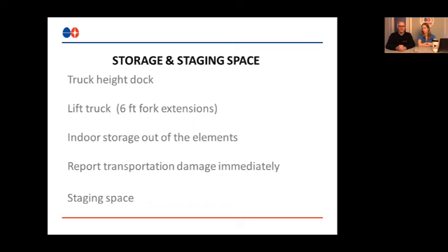If there is an opportunity where, or the issue comes up where product has to be stored, it's important that the product is stored away from weather elements. So indoor storage is preferred. Once again, climate control is preferred because we have boxes and crates that contain the thin pave and the silicone. We don't want it to be frozen at any time. It'll compromise its function.